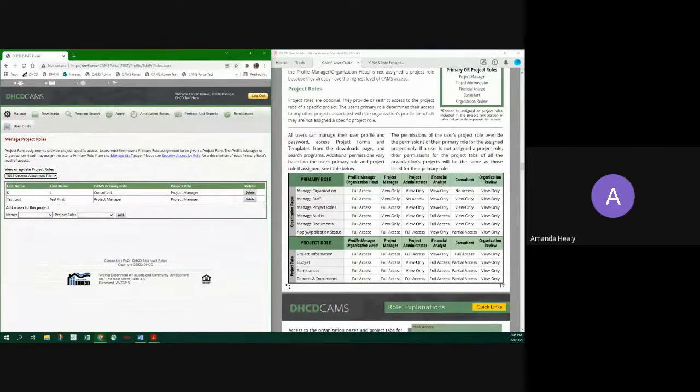Thank you, Amanda. Hey, this is Kenny from CERCAP. So I'm thinking, isn't the consultant for a small town going to be the one entering most of this information into the portal? So wouldn't they have that access to do that? They could enter it and save it, but the submit button has to be done by somebody who is an employee of the local, the grantee. Right. That's how we've done it in the past. So they could prepare it, they could upload it and save it, but then somebody like the mayor or the town manager or the town clerk would have to actually submit it.